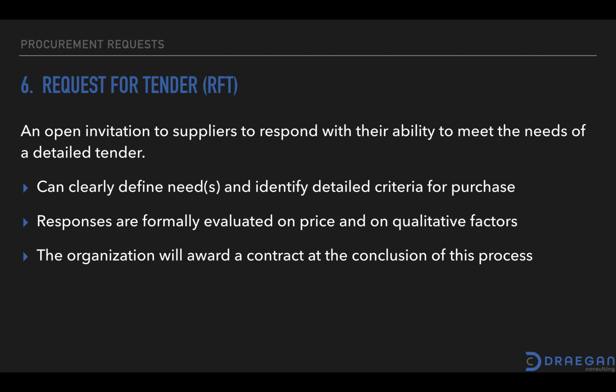It also incorporates qualitative factors, but you need to know exactly what it is that you're looking for so that evaluation can be fair, transparent, and open. The organization will award the contract at the end of this process. So these are done, again, when there are very clear guidelines and specifications, but when it is not going to come just down to price.